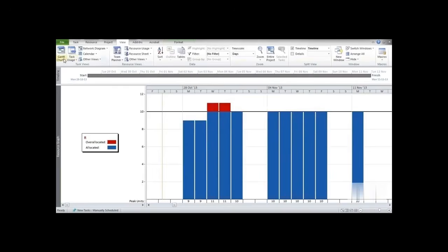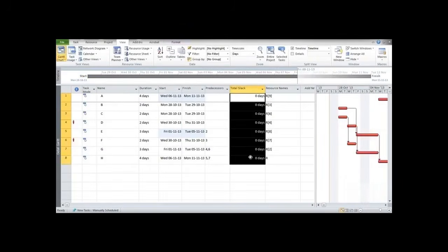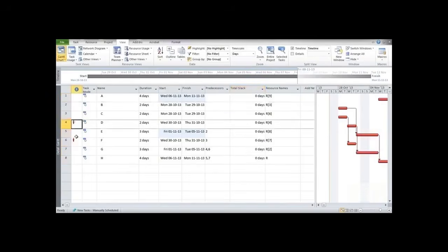Now getting back to the detailed Gantt, now you can see the available slack is 0, so that all the slack is consumed over here in order to balance the resources. Now still here you can see these two red markings which says the resources required are more than allocated. So one thing is that you can increase the duration of the day if possible, or reduce the demand for resources to complete that work. So this is all about resource leveling in Microsoft Project 2010.